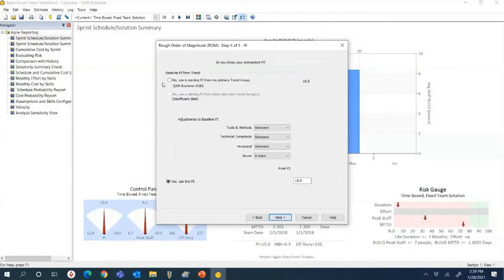And then we're going to put in that productivity index that I mentioned, which is calculated from our historical data, or we calculate it based on the QSM Industry Database of most recent projects, based on the application domain. Now, that's one approach.